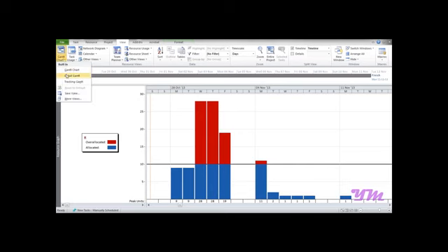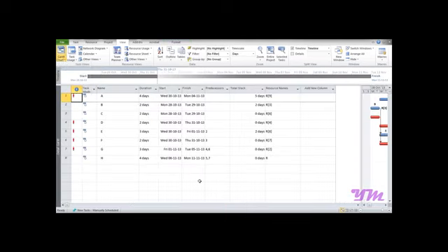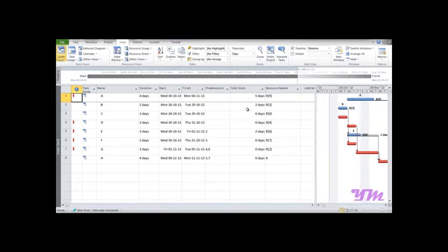So let's get back to the detailed Gantt chart over here. Now you can see that we have slack available for some of these days for A, B and E. So delaying the prior activity would not affect the overall project cycle or project time. So one way to settle this issue is by using the slack. So let's readjust these activities so that some of the work can be carried out on another day, thereby not affecting